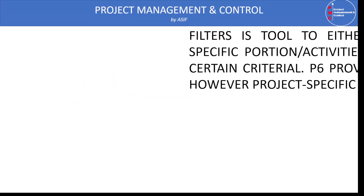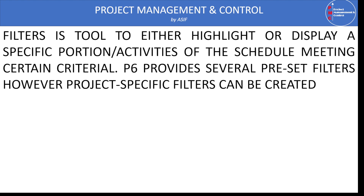Filters are defined as very useful and handy tools in Primavera P6, which are used to highlight or display a specific or certain portion of the schedule — their activities and data which are meeting a certain criteria. It is a very useful command especially for large projects containing thousands of activities, because in this case we cannot show all the activities at the same time, and it is difficult to show all the activities on a single or two pages to present to management. So in this case we can use the filter command to highlight or mention specific data, activities, or deliverables.